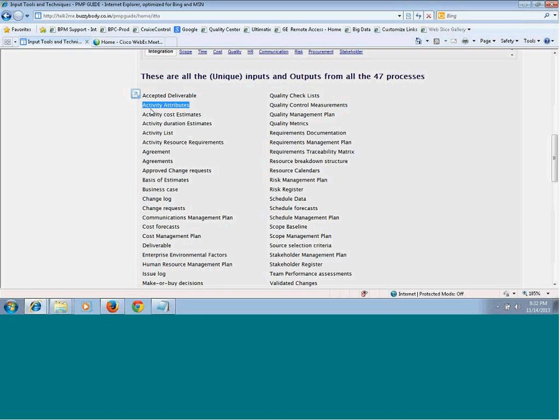Now, create work breakdown structure. What you will break in the create work breakdown structure is your scope; the entire scope will be broken down in the work breakdown structure. So the project scope statement will be your input to the work breakdown structure. Now the project scope statement, how are you preparing that one? It is the output of define scope.